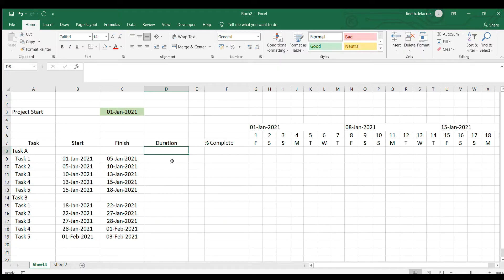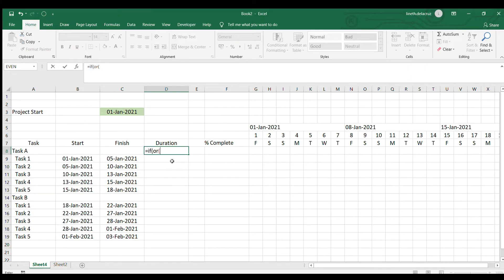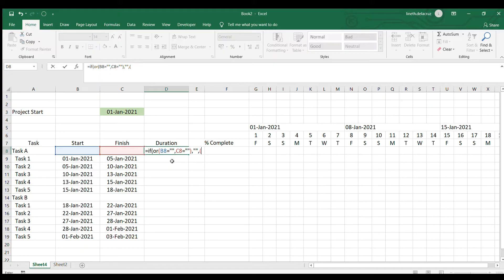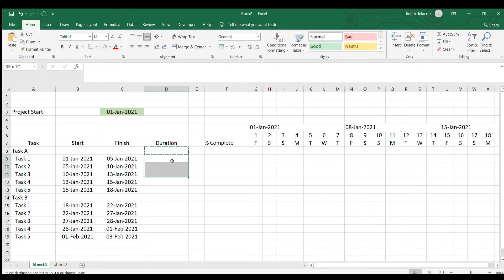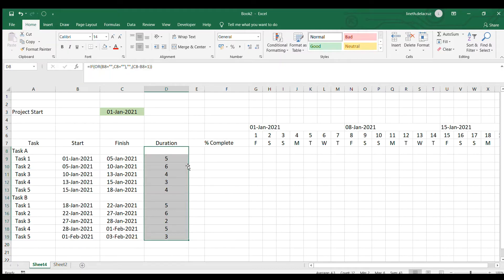I'm going to use the IF formula with OR. Writing the IF now, then OR. The first logical test is: if the start date is blank OR the finish date is equal to blank, close the logical test. If this is true, the value will be blank. If false, the value will be: finish date minus start date plus one. Enter it, then copy and paste it, and center it. That's the equivalent duration in days.